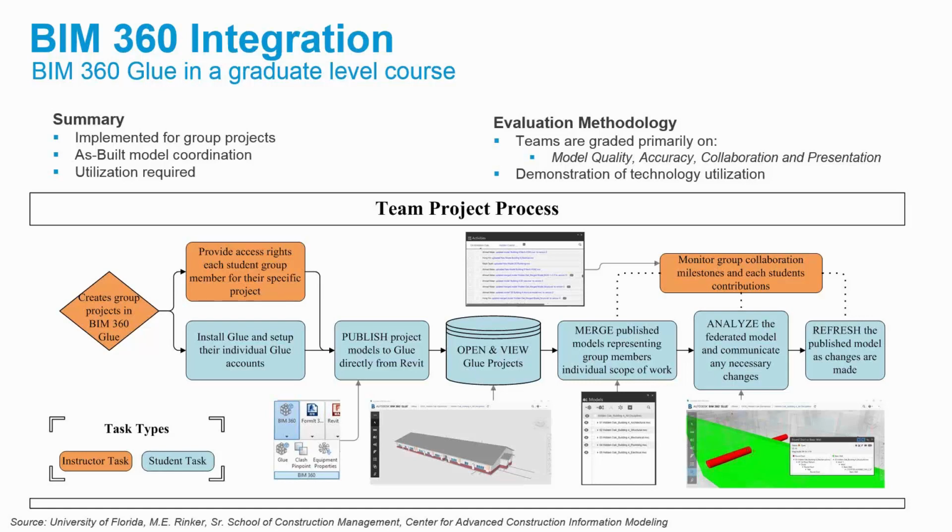What we expect them to do, once we get through their initial introduction to these things, is publish their models weekly. In ideal situations, they can open those models and view them in class. When I work with them every week, we go through these models and look at their progress, see any pinch points, and see potential areas where they might need to be tugboated back onto a different path as they stray a little bit. We encourage them to merge their models with each other's models to analyze those throughout the entire process, and get to a good conclusion without major hiccups at the end where things don't align.